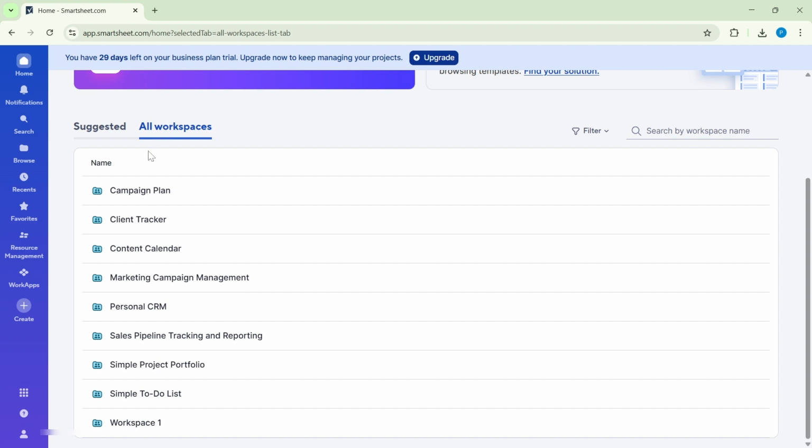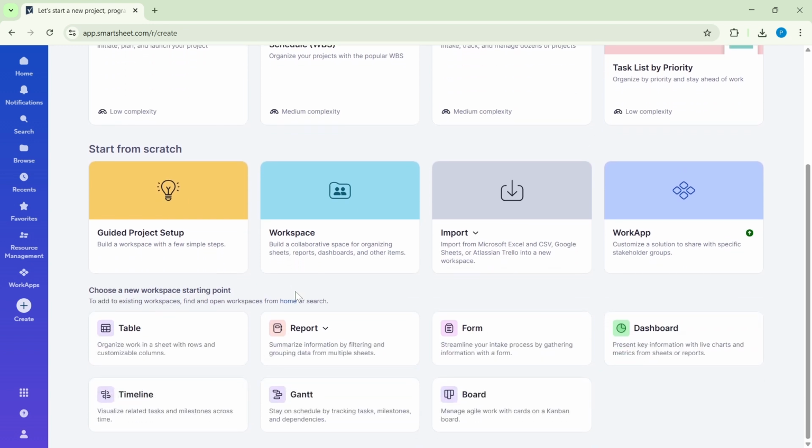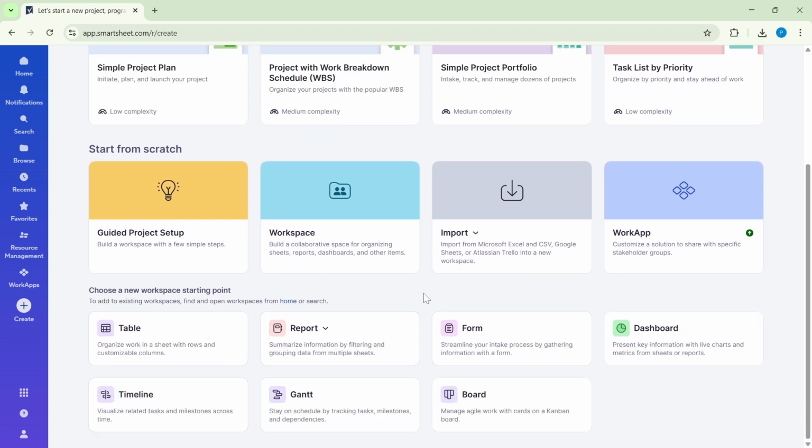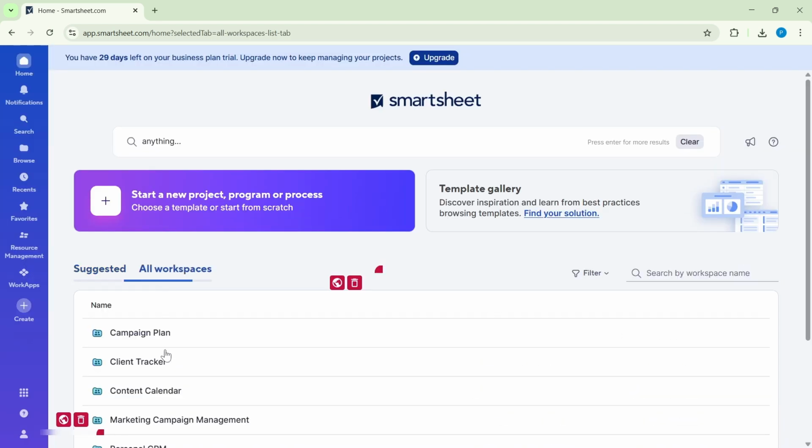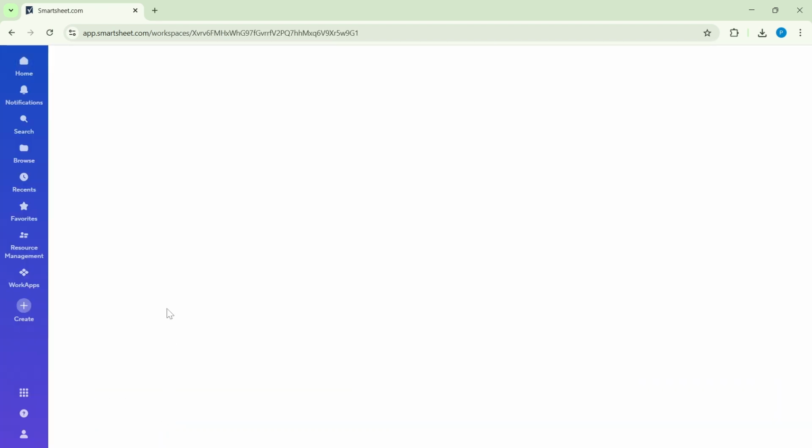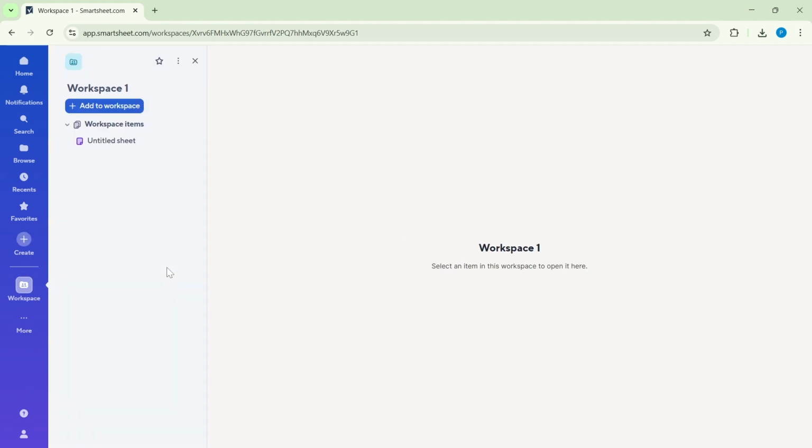To accelerate data management, let Smartsheet help you create structure. You can start with a prompt such as, "Create a project tracker with columns for task name, assignee, status, and due date." If your data is messy, use tools to autofill or cleanse patterns, like standardizing dates or completing missing statuses where possible. When logic gets complex, ask for formulas, such as, "Create a formula that calculates the number of days between the start date in column A and end date in column B, and apply it down the column."